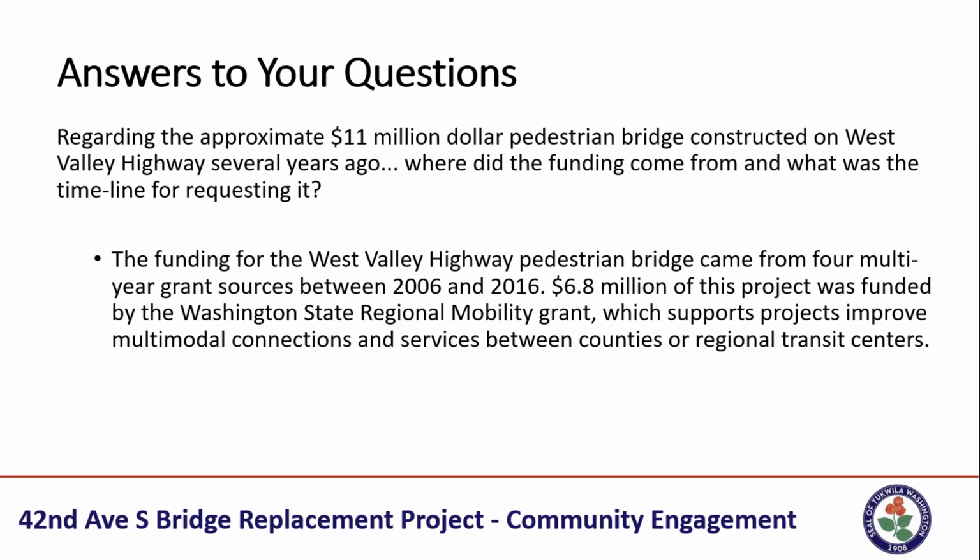So this particular question is regarding the approximate $11 million pedestrian bridge in the CBD area, West Valley Highway. The answer to this is the pedestrian bridge design grant effort started in 2006, a long time before the grant was granted in 2016. Usually these bridge projects take 10 plus years to get. These are not something you apply for and get immediately. So that's the timeline of it.